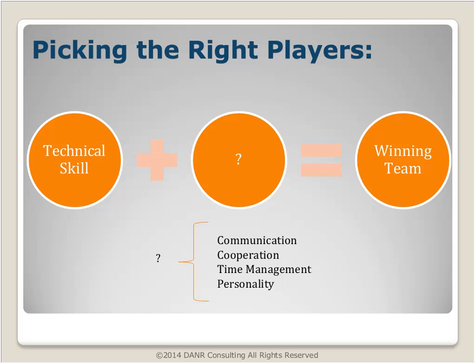So let's face it, as integrators, oftentimes we don't have choices. We've got a limited number of resources in our organization. So what we should do in that situation, when we've got to pick these teams and we know that there are going to be some issues and they're not going to be ideal, is work on recognizing what those issues are up front and then finding ways to manage them. Let me give you an example. If you have a whiner personality on your team and you know the individual likes to just spend time complaining and venting, then plan as a PM to stop by his or her office 10 minutes twice a week and just ask how things are going.